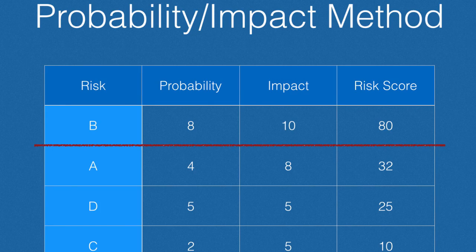Once I've done that, I'll define some sort of threshold. For example, using a scale of 1 to 10, I might set a threshold of 80 — every risk with a score of 80 or greater is one I'm going to invest time in developing a risk response plan for. How am I going to mitigate the threats? How am I going to enhance or exploit those opportunities? I would develop a risk response plan, a contingency plan, backup plans — whatever is appropriate for the risk at hand.